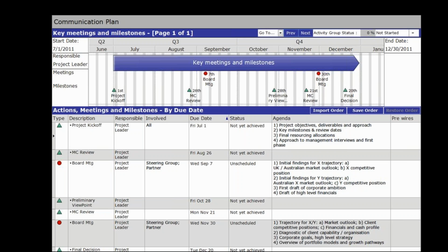And I will tell you this before I get into communications, that once I tell someone the communications plan, one of the strengths of it is it sets expectations back to the stakeholders. They know that on Friday they're to expect a project progress report, a dashboard update, and they get it. And when you do stuff like that, it keeps everyone calm, it keeps everyone engaged, and so when I need them, they tend to come to your aid more, because they see you more as a professional. You've really been controlling everything. Everything you said was going to happen is happening, kind of thing. All right.